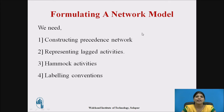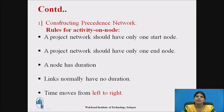Now, formulating a network model requires four methods: first, constructing precedence network; second, representing lagged activities; third, hammock activities; and fourth, labeling conventions. For constructing a precedence network, there are four rules for activity on node. First, a project network should have only one start node. Second, a project network should have only one end node. Third, a node has duration. Fourth, links normally have no duration — so nodes have duration and links do not.